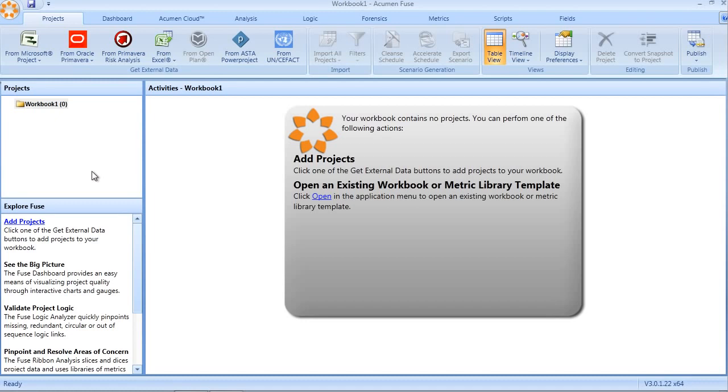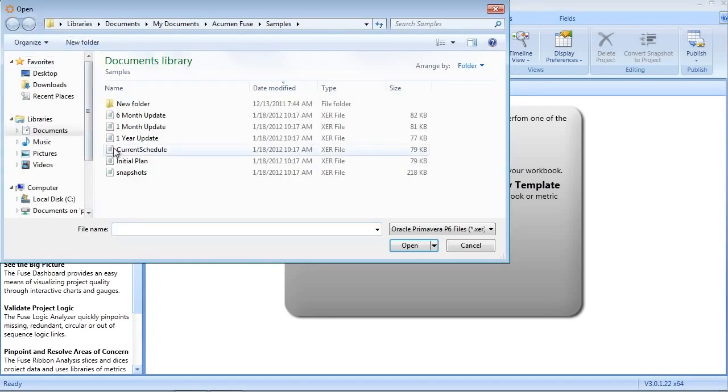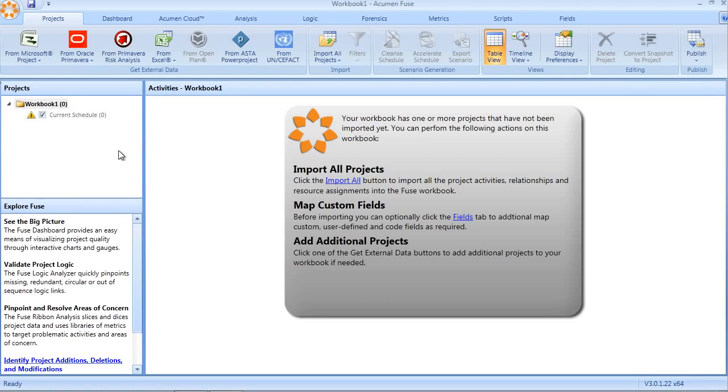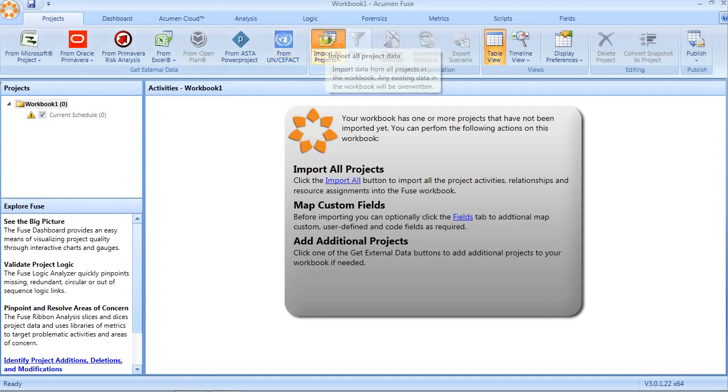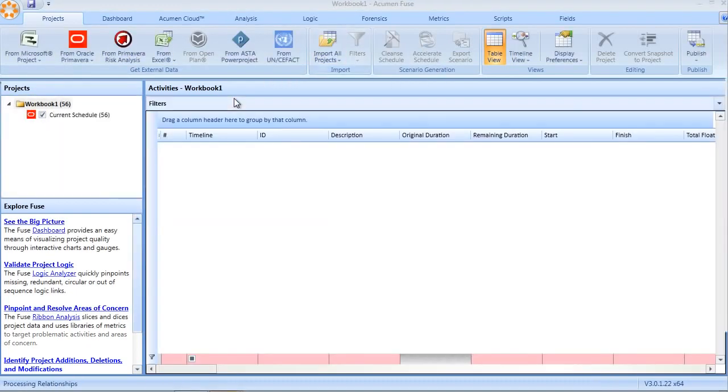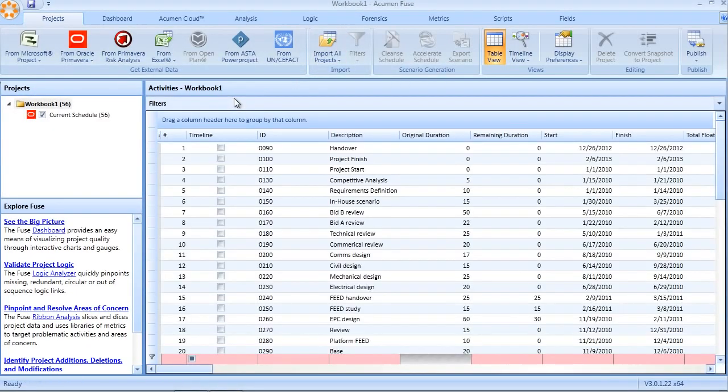Data import is a straightforward two-step process within Fuse. First, select the source file. Let's select a Primavera schedule. At this point, the file has been added to the Fuse workbook, but you still need to click the import button to actually import the data into the workbook.